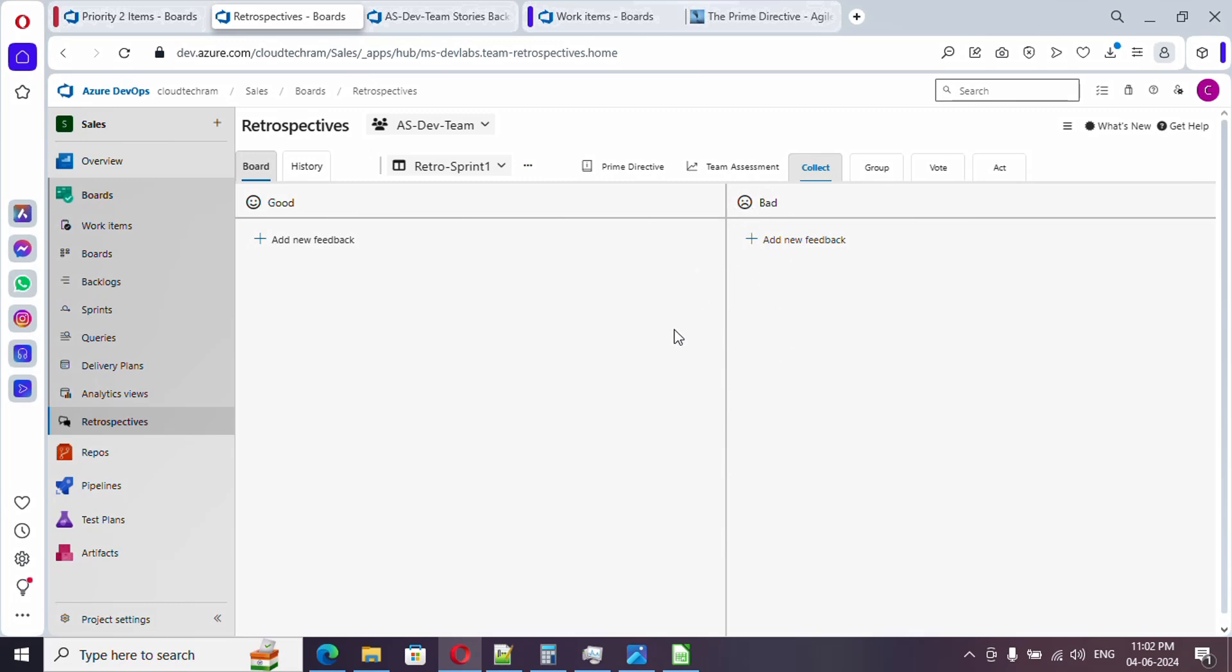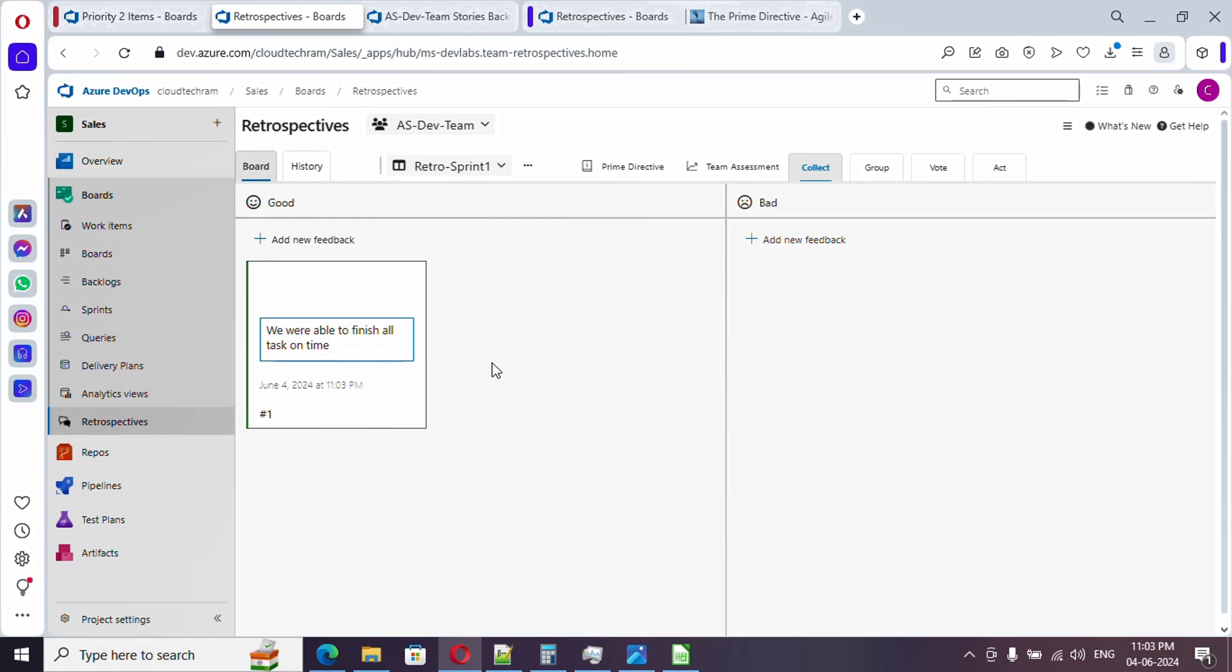First let's proceed to provide feedback of good. In retrospective meeting, every team member needs to add this, so everyone will have access to this board and this board will automatically sync. As soon as the other teammates are adding their thoughts into it, it will automatically show up here. The scrum master will provide time so that every team member will add their feedback, whatever they felt in the particular sprint.